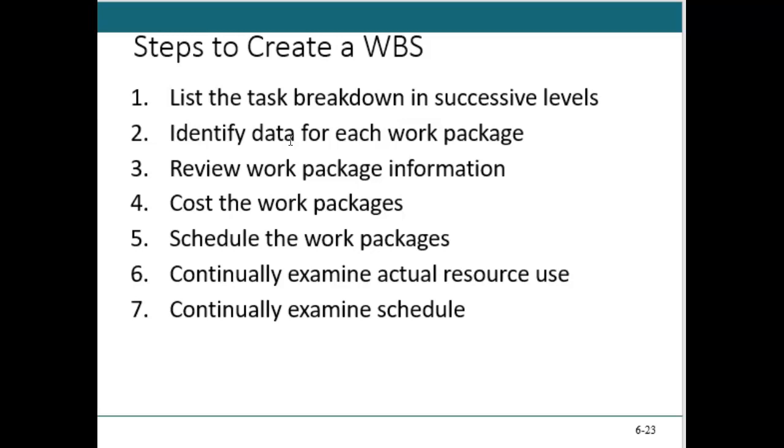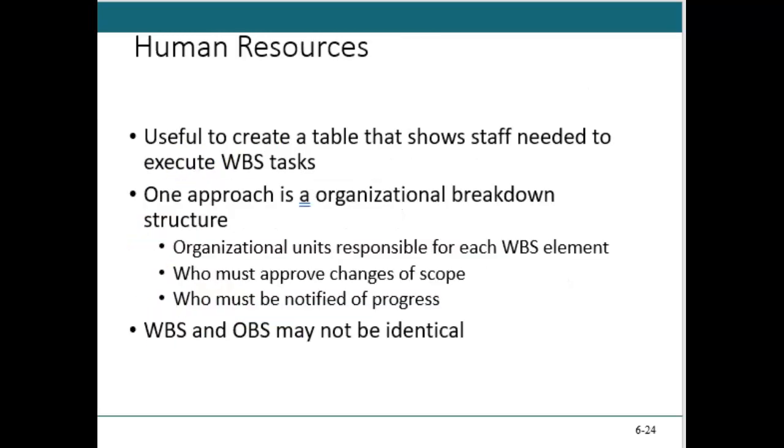I'm going to add control accounts to each work breakdown structure item, and that way I can add them up using the control accounts, and I can manage my costs by work package, but aggregate them up into a single budget. I'm going to further break down through decomposition after the work packages, the items in the hierarchy, into activities, and those activities become items in my schedule. And then, of course, plan, do, check, act, okay?